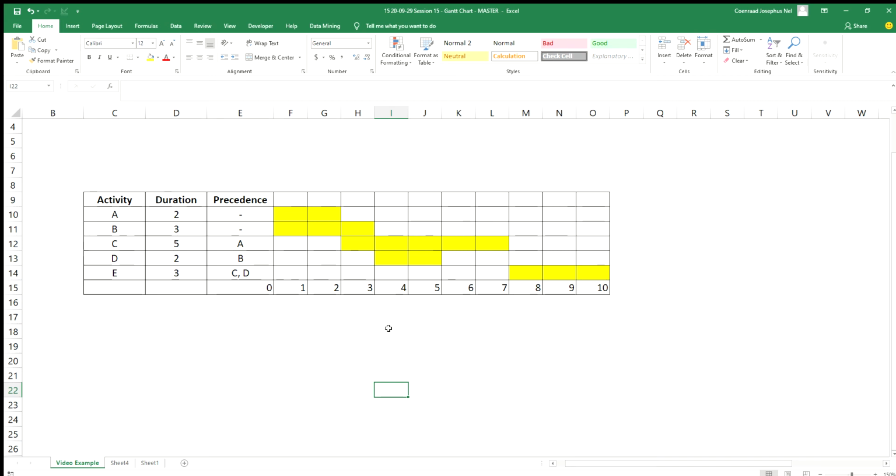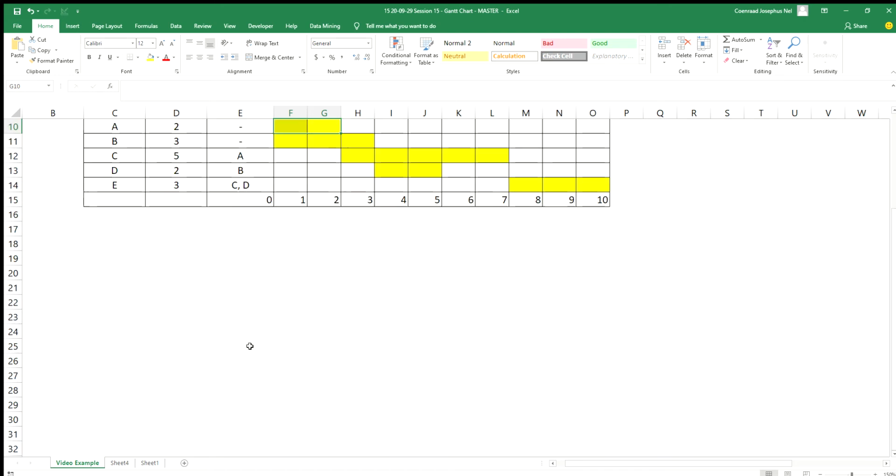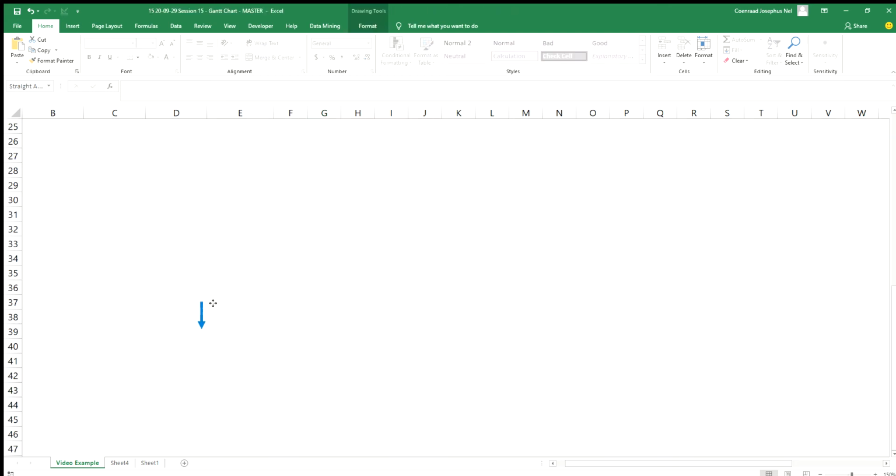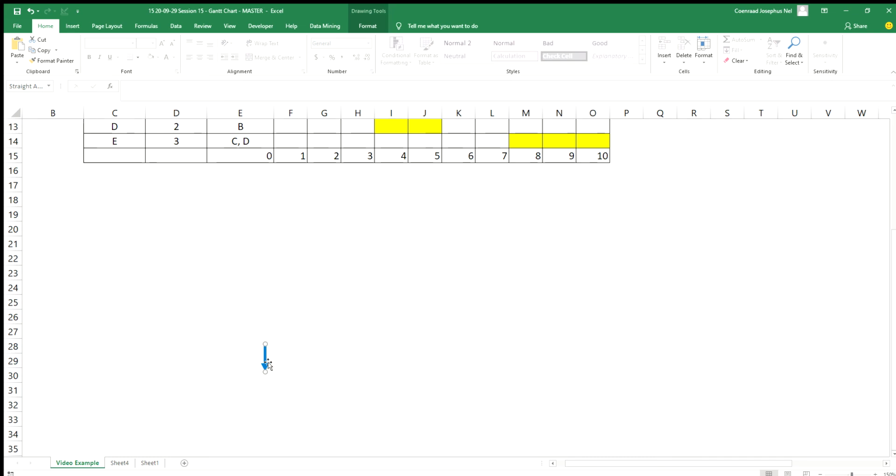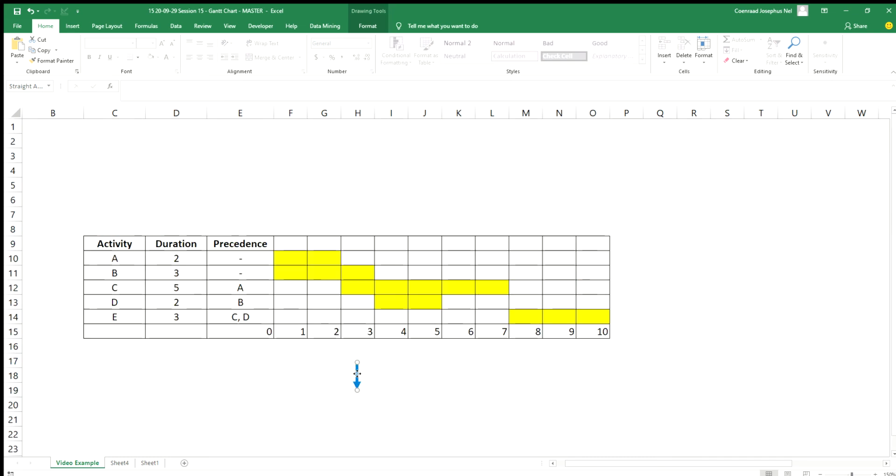Now what we do, if there are activities which sort of don't make sense, we said we're going to put a vertical line in. So let's have a quick look. A starts over there, finishes over there, and C needs A. But it's confusing to know that this activity over here, C, needs A. So that's why we're going to put, and I just put a sort of a pre-arrow over here, so I don't need to draw it again with the example. So what I'm going to do, guys, I'm going to put an arrow over there, and that arrow tells me that this activity is followed by this activity.